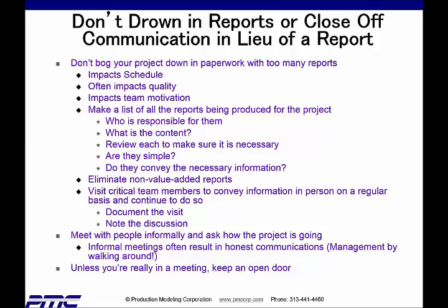Make a list of all the reports being produced for the project, who is responsible for them, and what the content is. Review each report, make sure it's necessary, and make sure it's not being repeated in another report that somebody else is doing. Are the reports simple? Do they convey the necessary information? If any of those answers is no, you probably don't want that report.